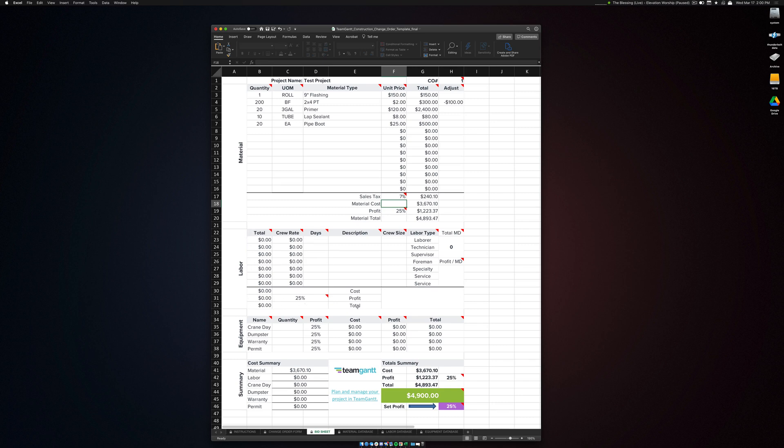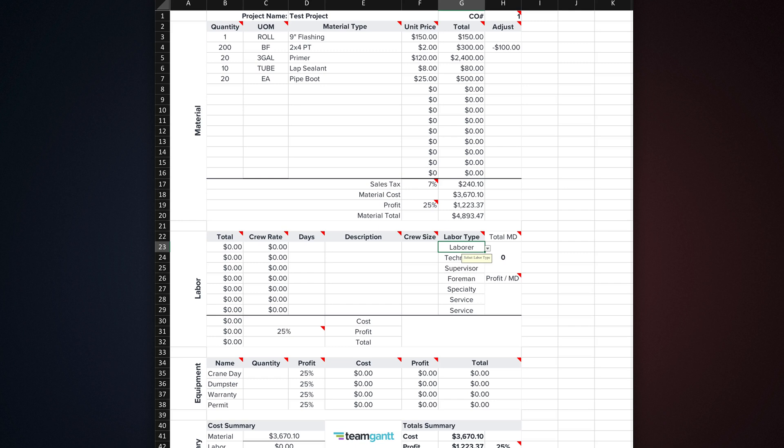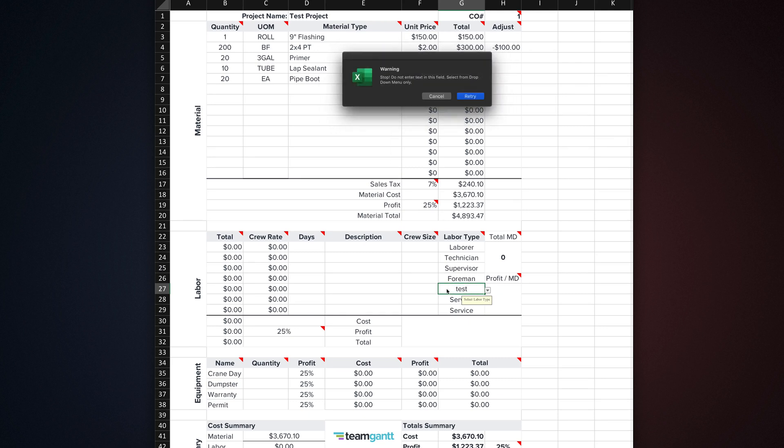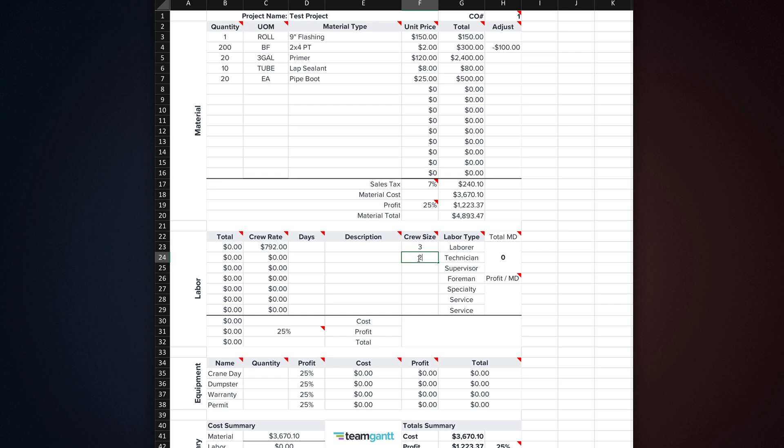Once you've entered all of your material items, your material subtotal is calculated. Make sure to adjust the sales tax to the correct percentage for where your business is located. For now, don't mess with the profit. We'll get into that in a few. On to the labor section. This is where you estimate labor for the change order. What's great about this section is that you can choose from multiple labor types that are stored in your labor database. One difference in this section is that you can't directly input any labor types from here. If you try, you'll get an error message. These are pulled from the database and are only editable from there.